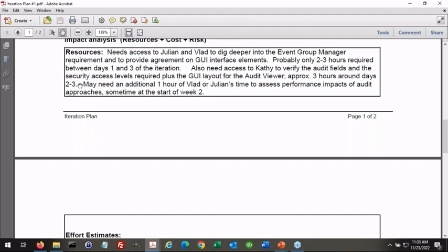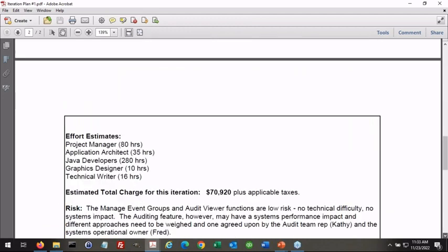Is this particularly specific? Is it a commitment? I'm using words like approximately and probably. When do you ever see those in a contract, right? But it sets some expectation with the sponsor about how much work, how much interaction we're going to need with the sponsor's team, with the stakeholders, because they're going to have to arrange to have those staff available to work with us approximately in those time frames, so they know if somebody can go off on vacation that week or not, or are they going to have to work with us. And we also provided not only how much resource time we need from their staff, but what about our staff?